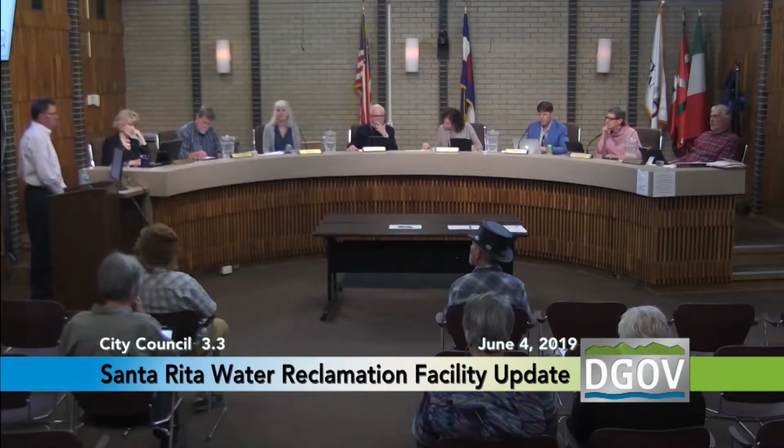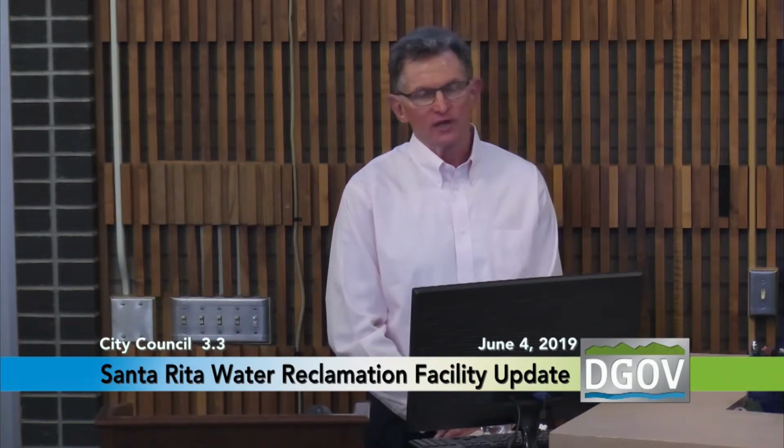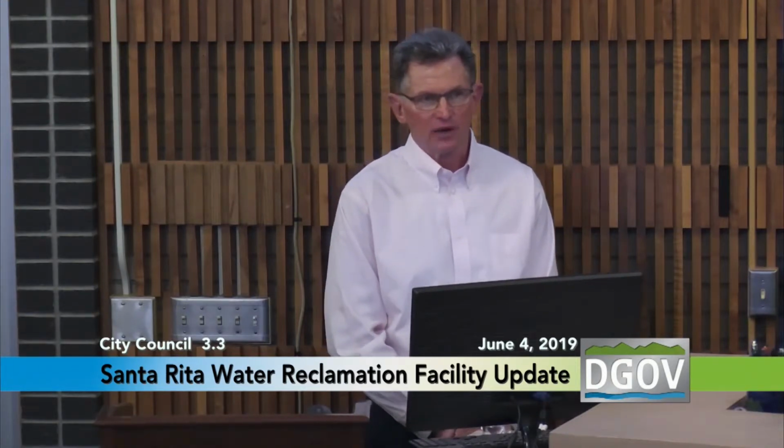So we have two training processes. Each piece of equipment has their supplier that comes in and they start up the equipment. And at that time, they provide all of the staff the training on that particular equipment. We also have our design consultant that comes into town and explains how all of that equipment works together to create the product that we're looking for. So we get training from the actual manufacturer and also the person that did the design on the plant.